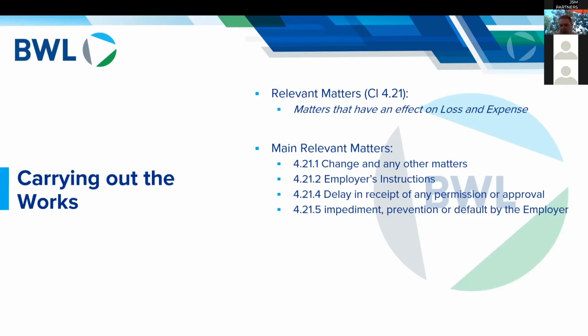So that's the final account being the money that's been, the final amount of money to settle the entire build cost. One of the items of the final account was loss and expense. And the arguments were around whether or not the employer had caused an additional loss and expense by their, rather than it being their actions, it's actually their omissions. It's things they haven't done.